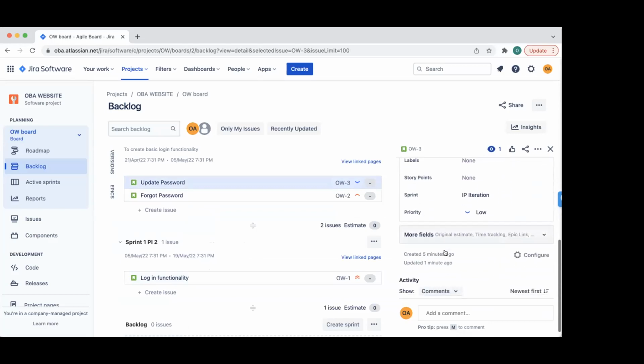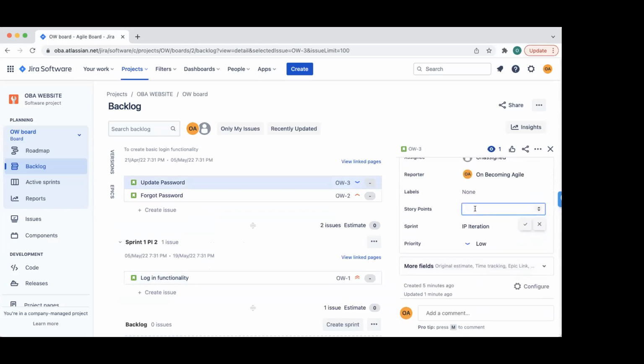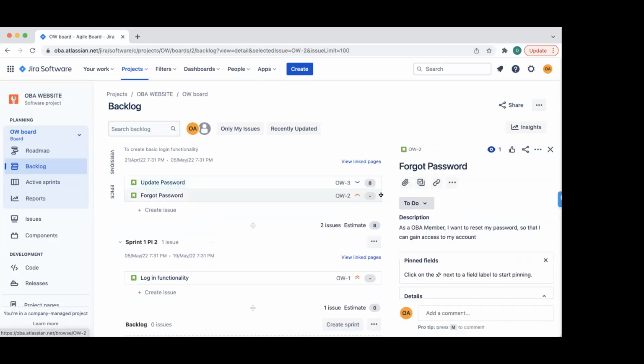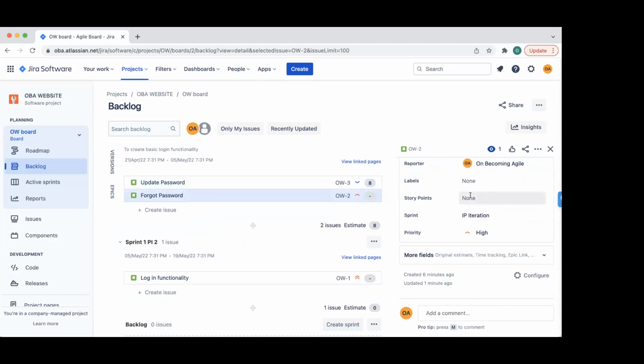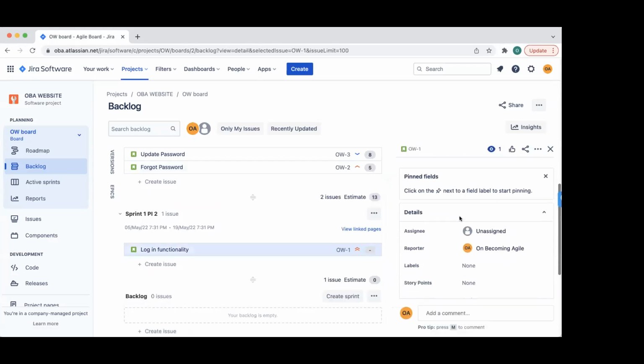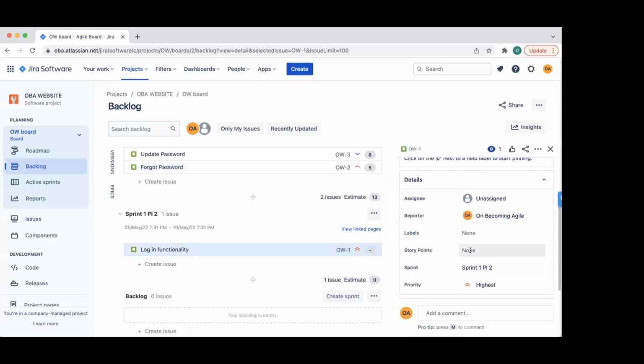And you can add an estimate easily by just opening the story and saying I put 8. And that's why you see the story points here, right? Right now it's showing dash because we didn't put anything there. Once you click on this, after your team has voted and agreed on this point, you come here and change it. Similarly, you do it for refinement, when you want to estimate. You want to make sure your team's estimating during refinement.